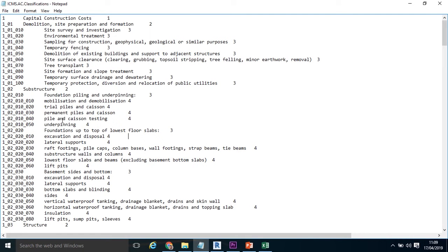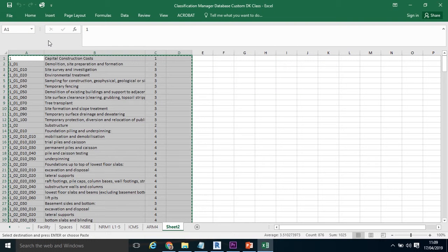If you're having trouble constructing this text file, what can happen sometimes is, if the coding structure is not logical, if the levels aren't in the right order, or even if there's a tab in the wrong place, when you try and add this through your assembly code settings, you could get an error and it won't accept it. An easy way to get this information in is to construct it first in an Excel spreadsheet.